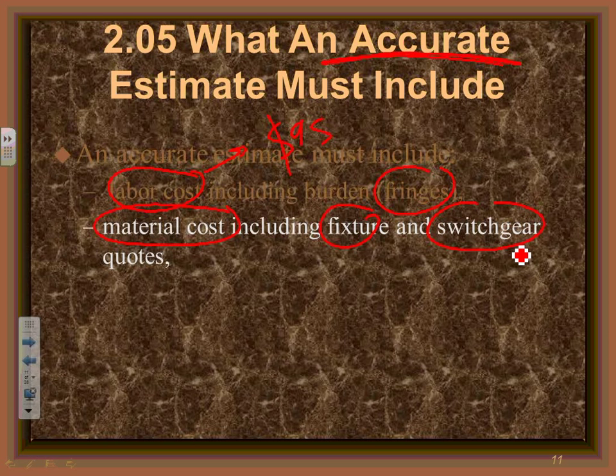You guys are 4 vendors, and I need to install a 4,000 amp switchgear. I will ask you to provide me a quotation for this 4,000 amp switchgear, and 4 of you are reputable manufacturers. I don't want a disreputable manufacturer to jump in and give me below standard quality equipment. And then I will pick typically the cheapest one or the least expensive quote that you get.